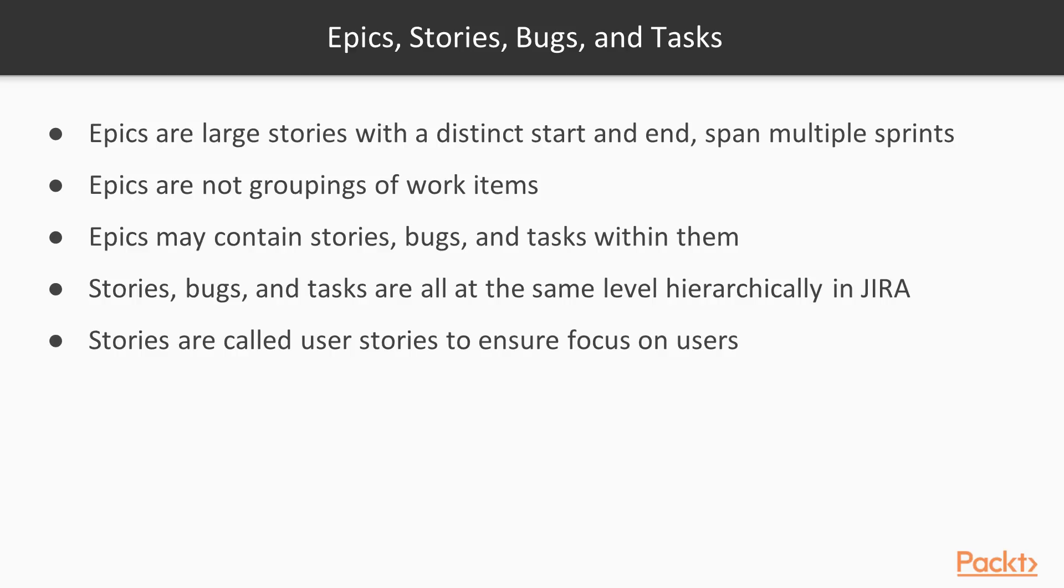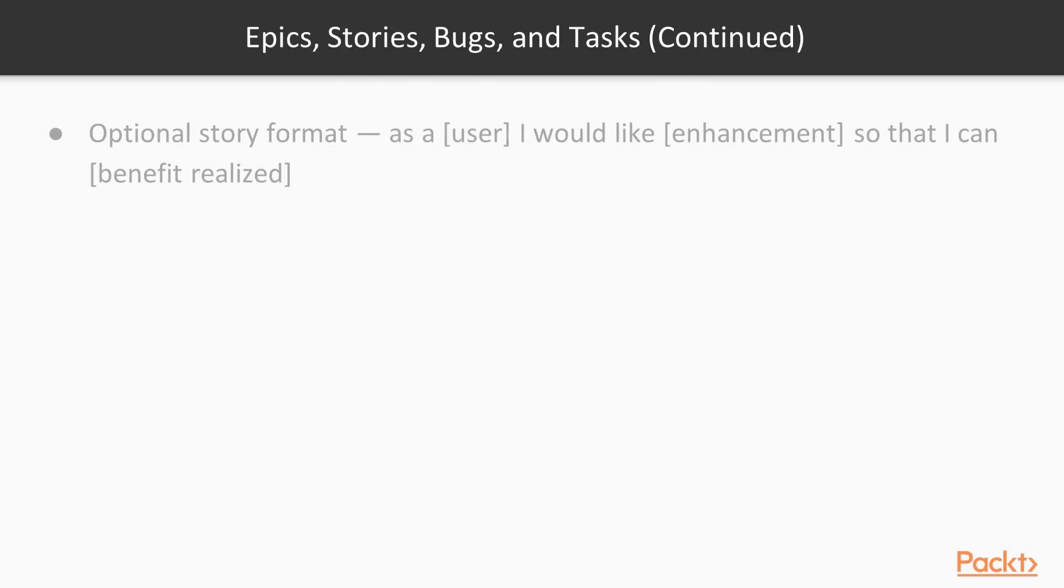And so that's why they call them stories or user stories. One of the things that people do in Scrum a lot is that they'll have a specific format. So you can see that format here. As a user, I would like some sort of enhancement so that I can have some sort of benefit.